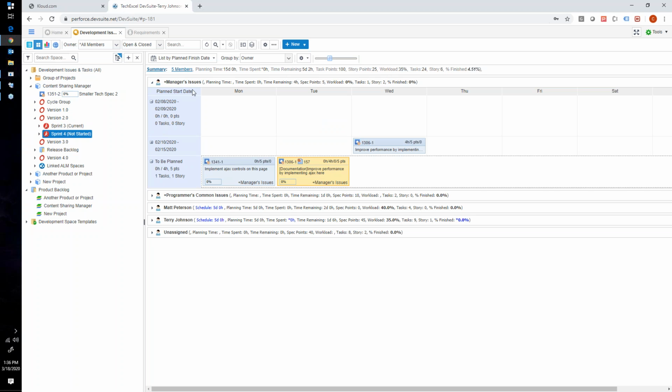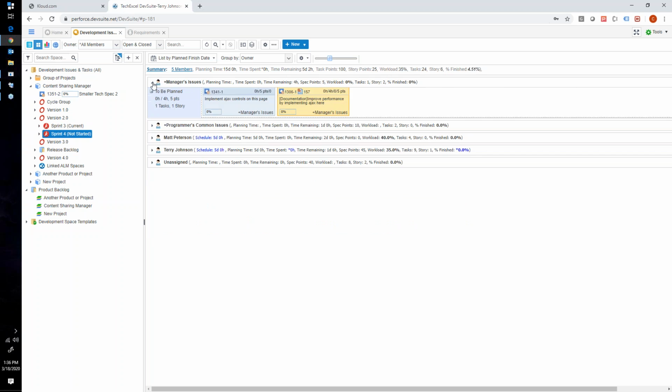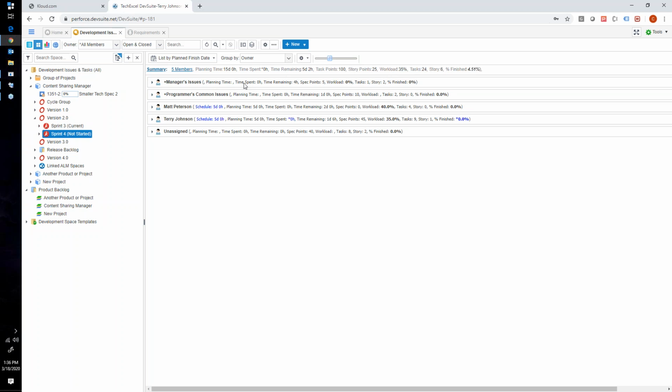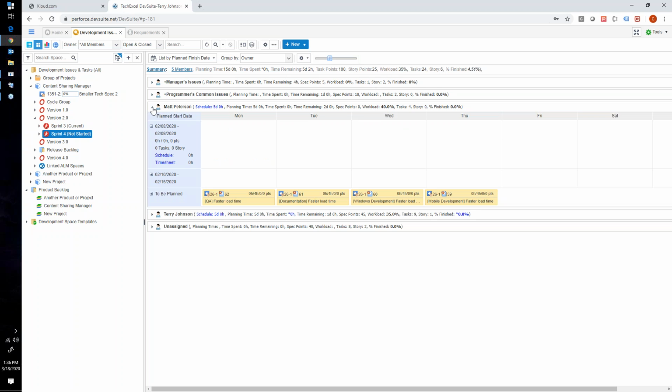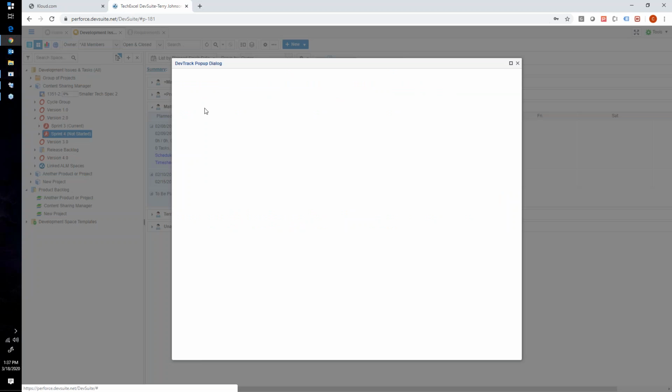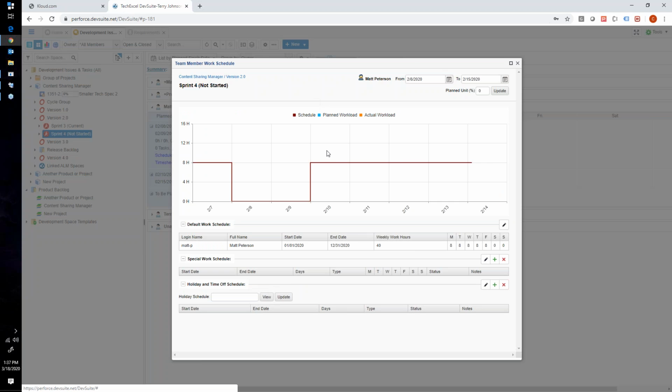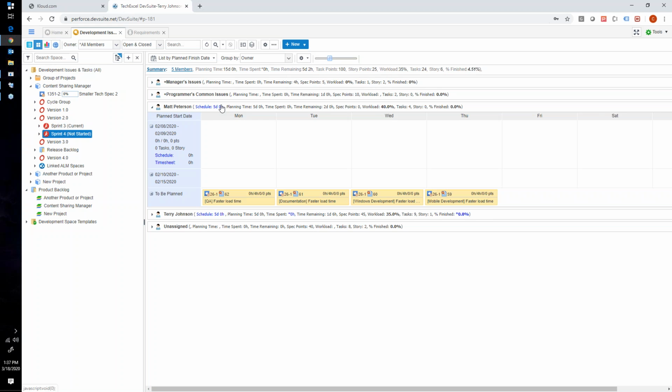All right, one last thing about this too is I don't know if you guys have been watching this, but you're also able to get that workload percentage. So let's look at Matt Peterson. He's got 40%. So earlier I showed you adding in time entries into these tasks. By doing so, this workload will come out. Okay. This is a 2-week sprint. So if I had this person working 100% by clicking on the schedule, and I said he's going to work 100%, 8 hours a day, right? Things like that. Then we get his capacity.